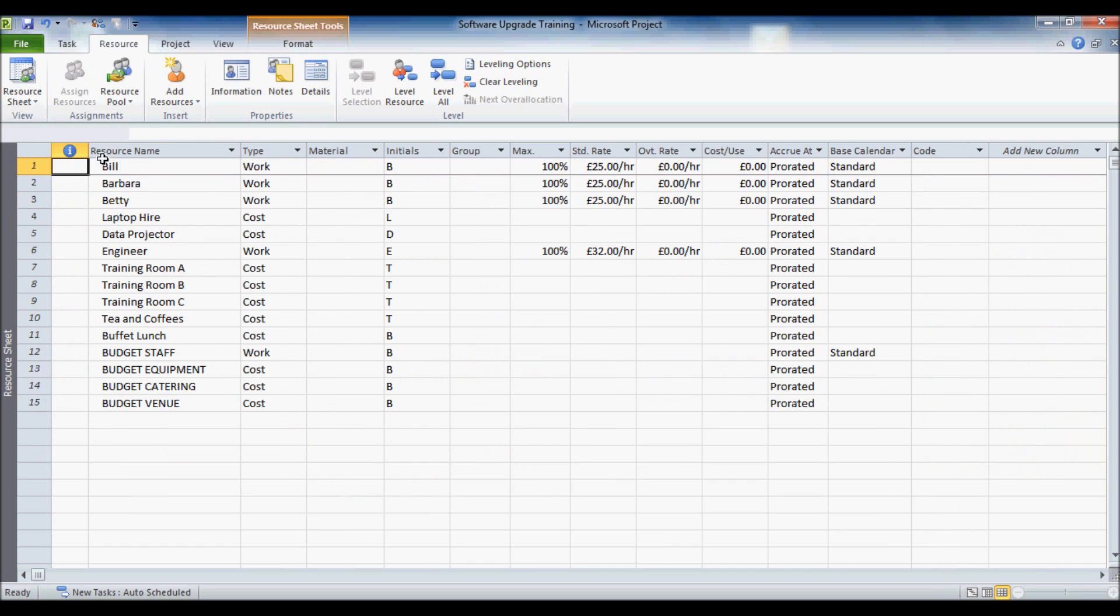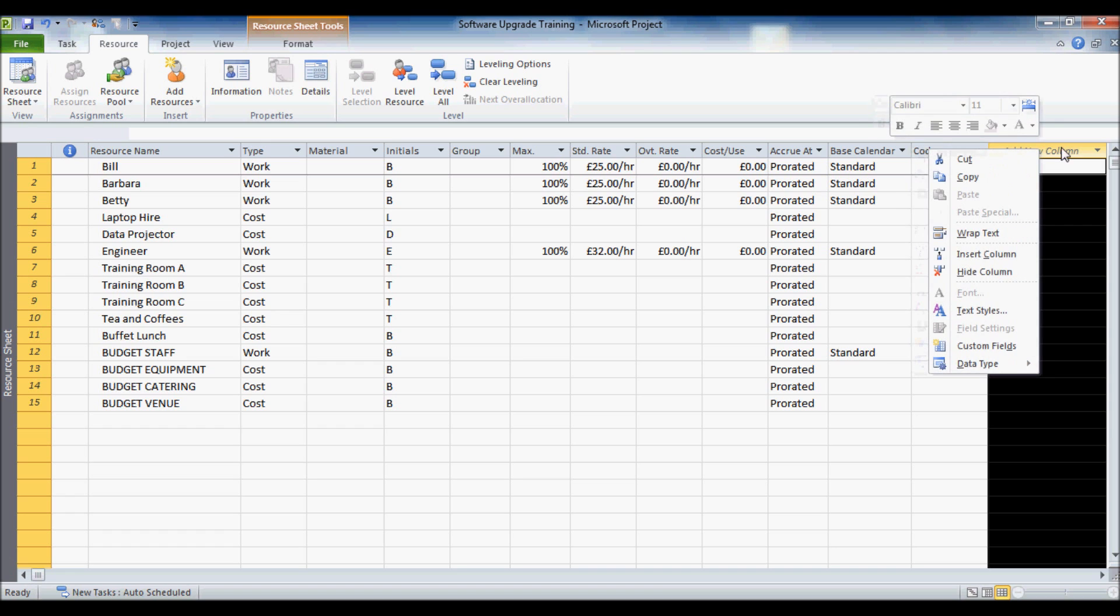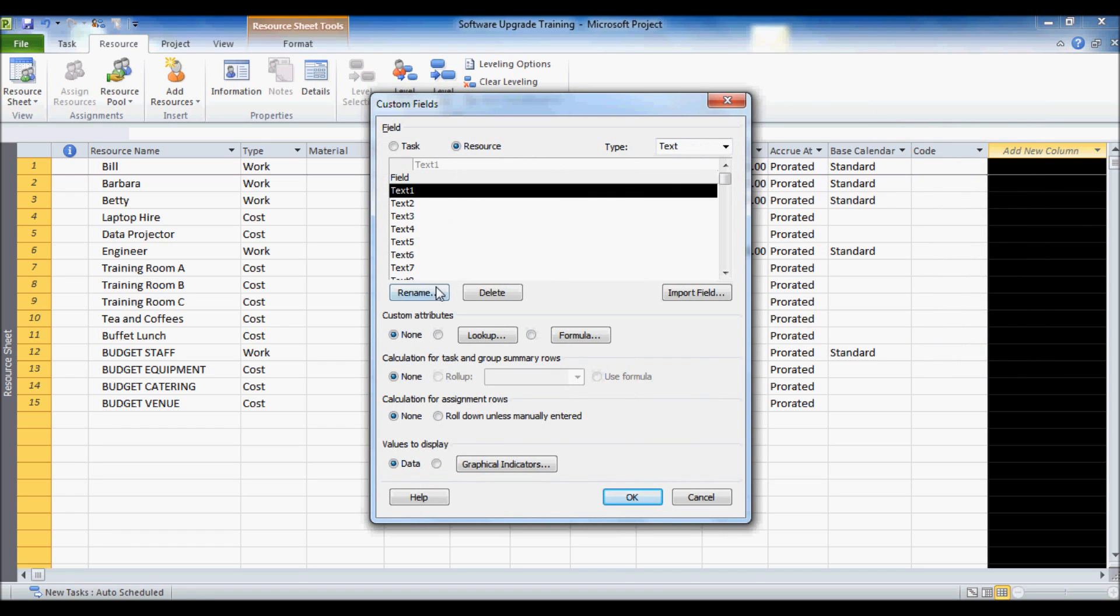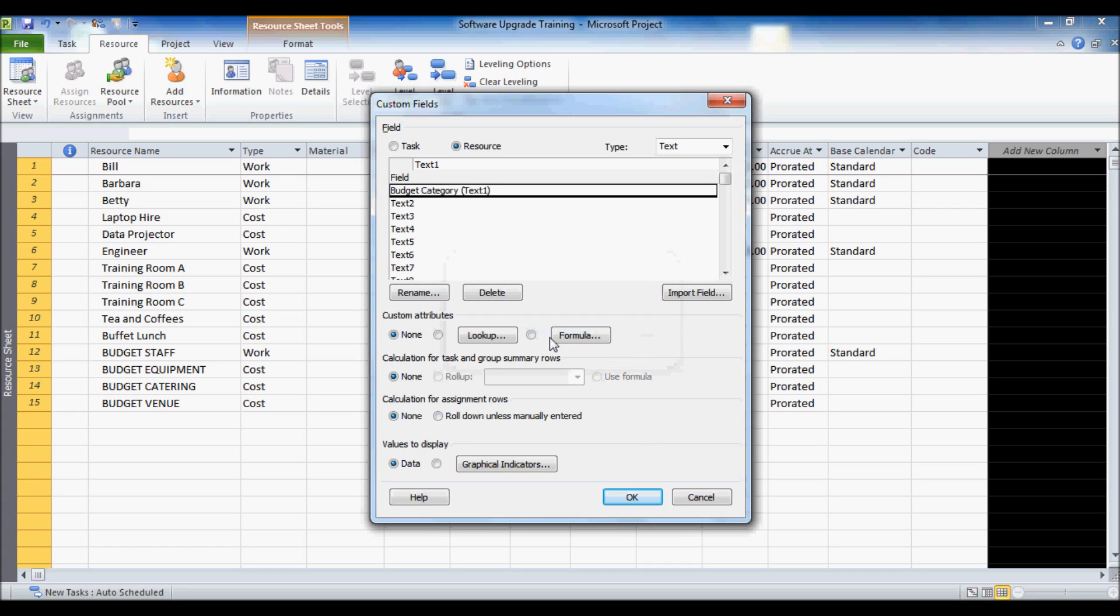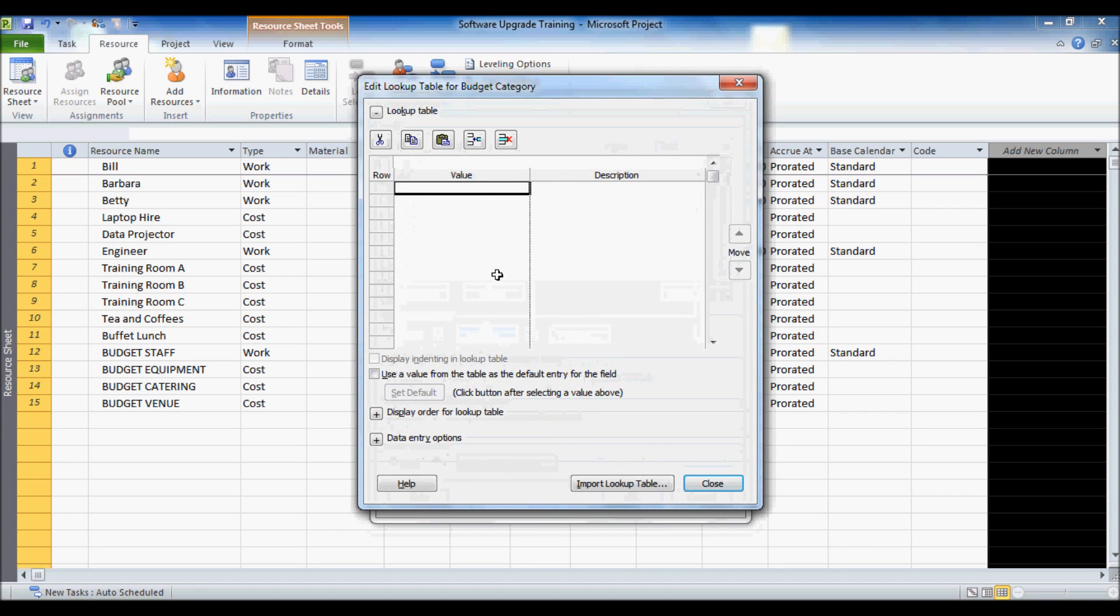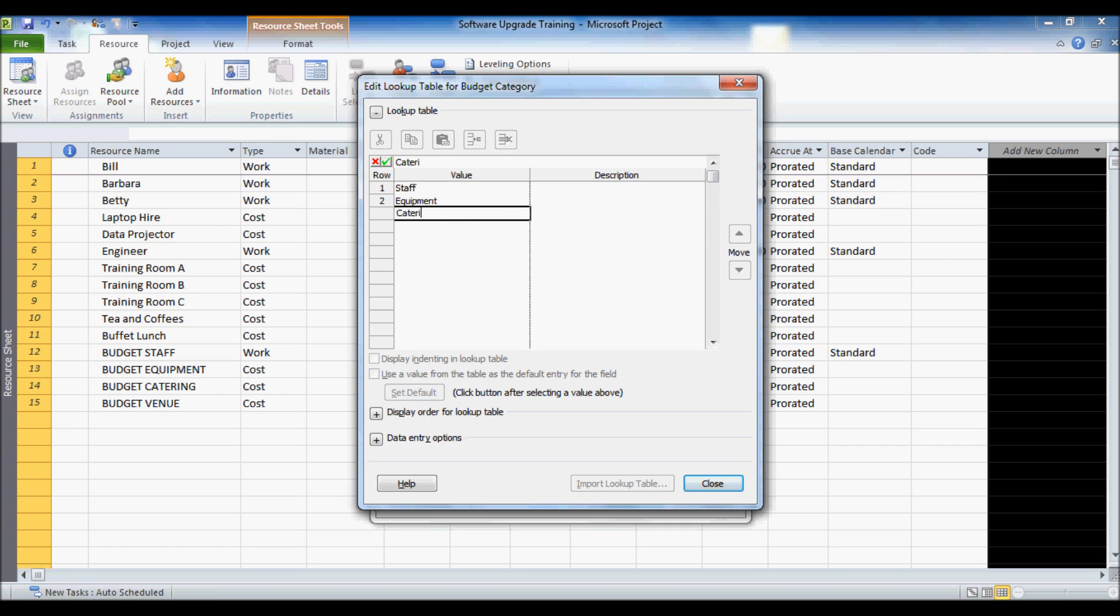What I need to do is some way link these resources to these different categories here. Now one way of doing that would be to set up a custom field. So right click up there, add new column, custom fields, and let's rename this budget category. What would be nice is to have a sort of lookup really, staff, equipment, catering, venue.